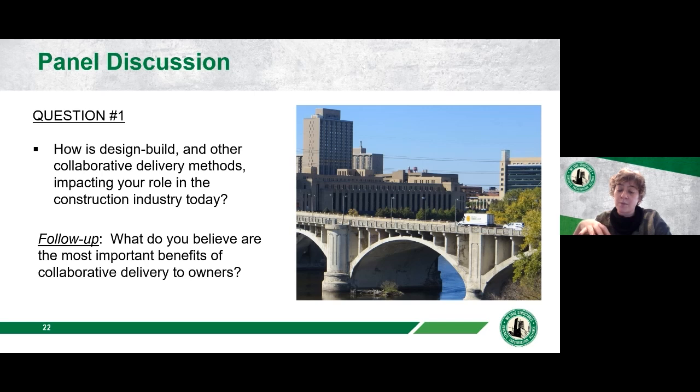They'll often then head through and do a market sounding, where they'll check with the marketplace and say, here's the way that we're looking to scope out this project. Are there any fatal flaws? Are there some challenges that we need to address? And there's certain items, for example, geotechnical work is one that often comes up, and uncertainties with geotechnical work. I can see John nodding, and I'm sure you got a lot of opinions on how geotechnical work is addressed. But making sure that things like that have been appropriately evaluated and addressed. And then throughout the project, especially in progressive design build, who holds the risk can get shifted back and forth before you head to the final GMP negotiation.